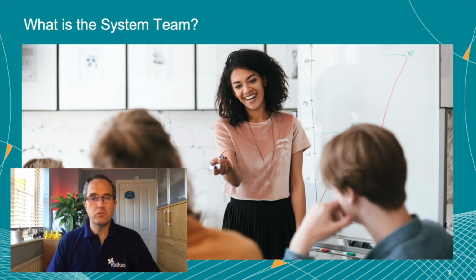Unfortunately, people often read this as the system team does the integration and system level testing only. They are not meant to be just a testing team. ARTs and the teams within the train own the responsibility to deliver integrated end-to-end code, and we should only rely on the system team where for good reason the teams cannot do it, not just because they don't want to. Valid reasons could be that their integration skills are specialised, or that there is an economic benefit like economies of scale.